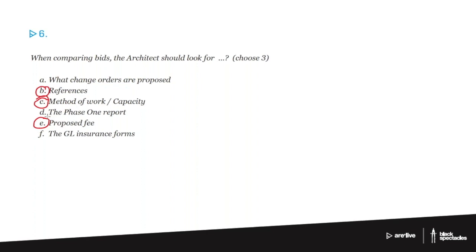Looking at A, what change orders are proposed. Change orders don't happen until a bidder has already become the GC. So it can't be A. You don't know at the bidding phase anything about change orders because there's no contract to change. A change order is a change to the contract. A phase one report is about environmental issues and doesn't fit to this situation.